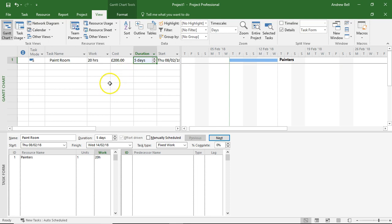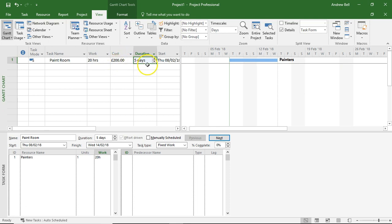They're going to get interrupted. They're going to have to choose the paint colour. So 20 hours of work, of real active work that they're going to charge to the project in five days is quite reasonable.